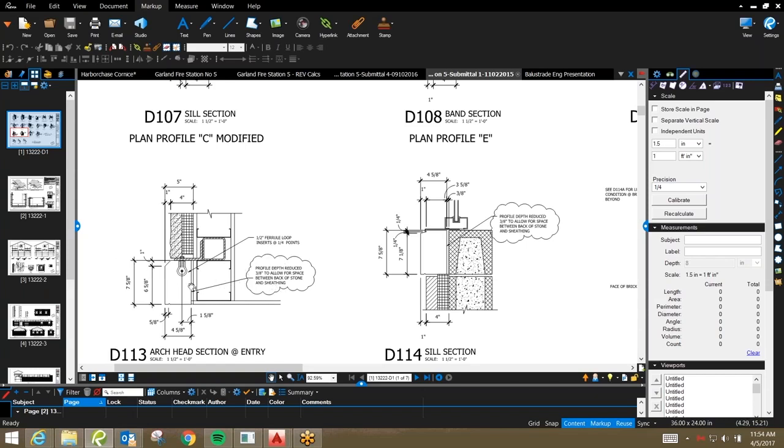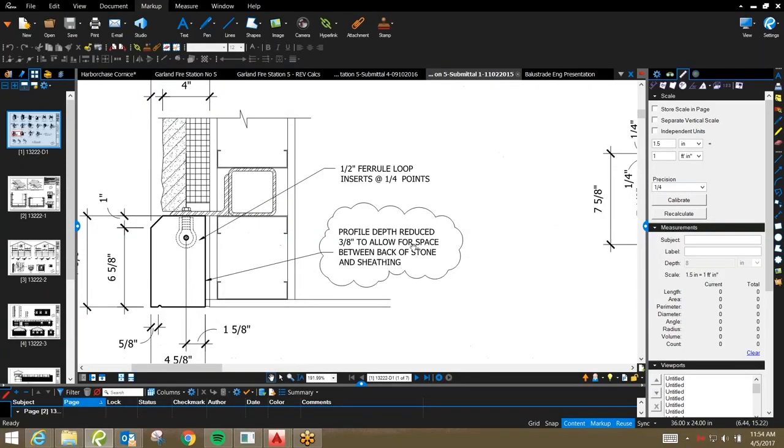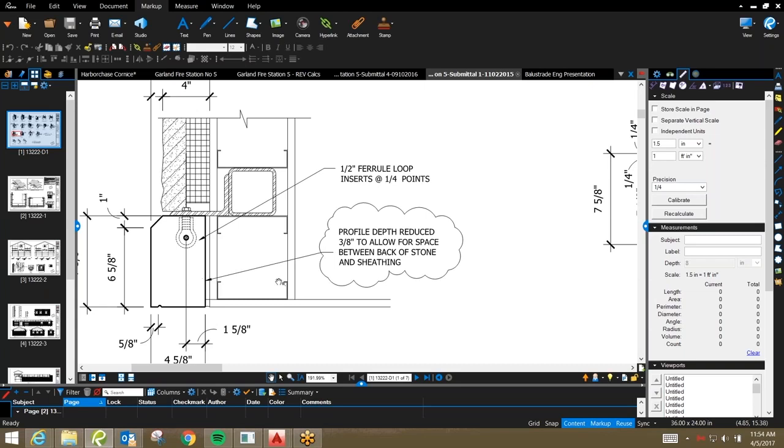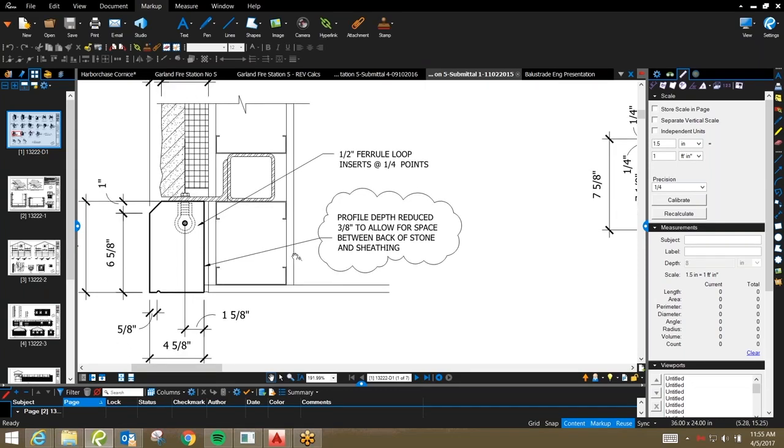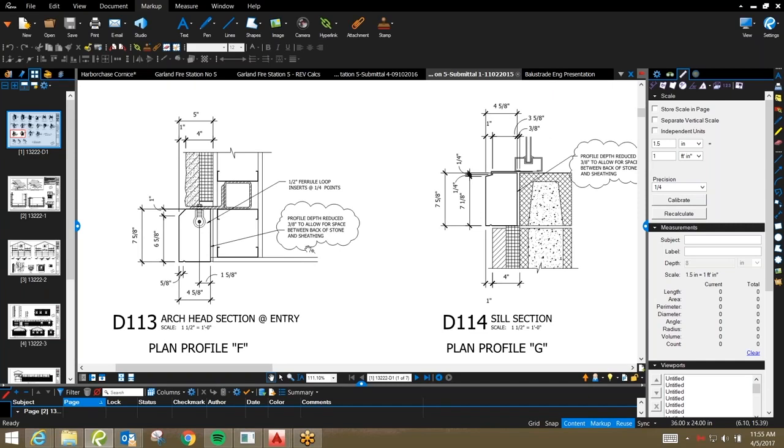So that if any materials are eliminated or changed or profiles are changed in the submittal process, we're not engineering something that is likely to change or possibly could change. So after the first round of submittals, which is what this is, and as you can see here, we actually in the submittal process before the architect had looked at this, we had revised some of the profiles where they showed the material actually sitting up against the wall. We've got to have some airspace between the cast stone and the structure. So we reduce the depth of the profile slightly to allow for space between the back of the stone and the sheathing on the building. Some of these things make a difference when our engineer looks at it. So that's one of the reasons why we don't on projects that we have engineering requirements on, we don't provide those engineering attachments until after the first round of submittals.